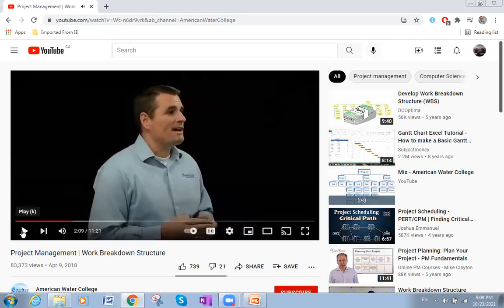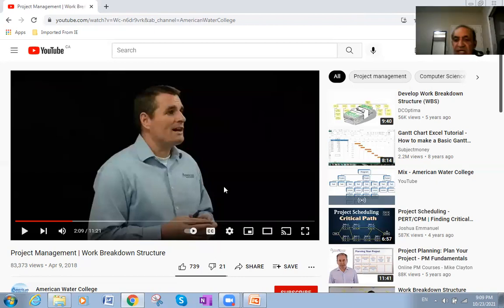The main idea: here in this stage, the breakdown doesn't care about which stage or which phase will come first or which one will be the order of each stage. It doesn't care about this, but it cares actually about what are the works related to this phase.